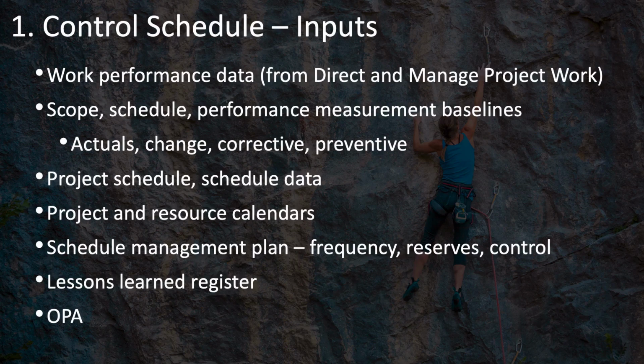The project schedule and schedule data, along with the project calendars and resource calendars, are needed in order to update this information and propose changes. The schedule management plan will specify the frequency with which you should be reviewing this information and updating the schedule, as well as how schedule reserves may be used, and the rules for controlling the schedule.